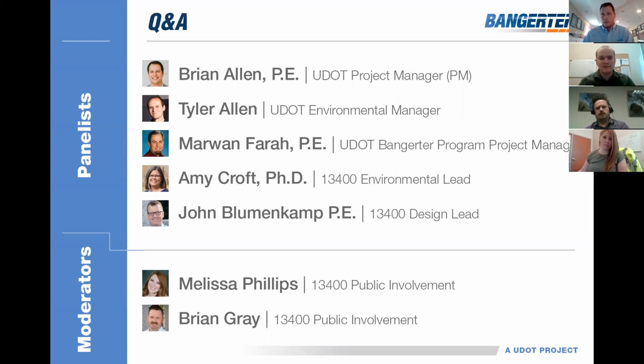And then we go through a process of the noise study, which is understanding the design, doing evaluation of the current noise situation in the area, running models for the potential change in noise, and then we establish where noise walls may be both reasonable and feasible. At that point, balloting would take place, and then the residences would have an opportunity to vote yes or no on those noise walls that were proposed. But the short answer is right now we just don't know. Understanding the needs in the area is what we're here for.